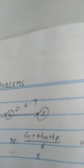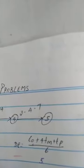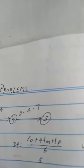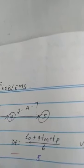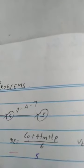That formula is normally called as TE. This is the formula. TE, time duration, T0 plus 4TM plus TP by 6. This is the formula to find out the duration of the TE activity.